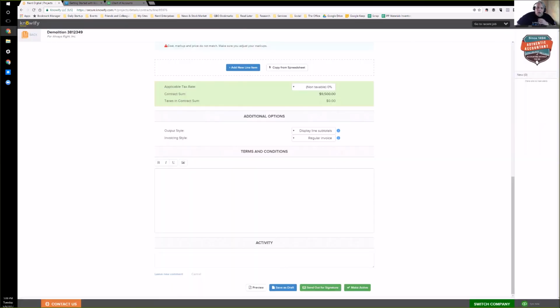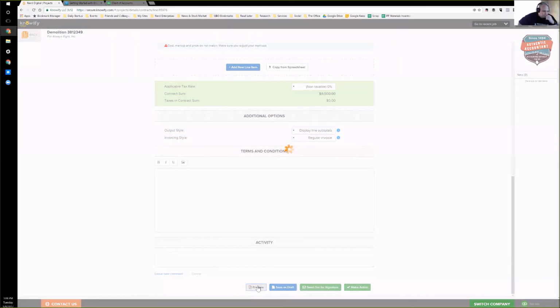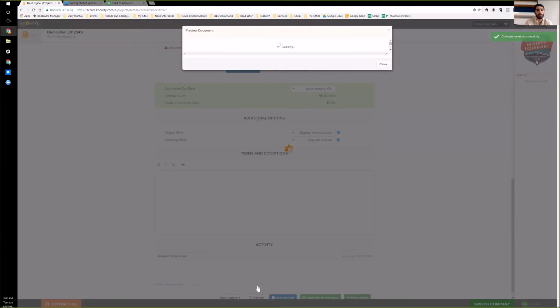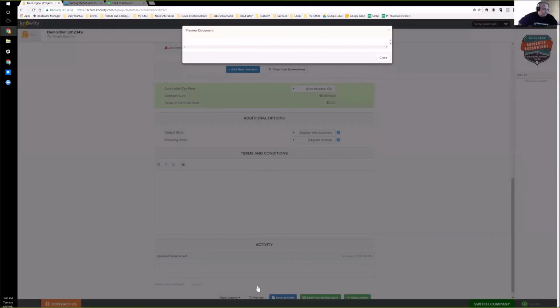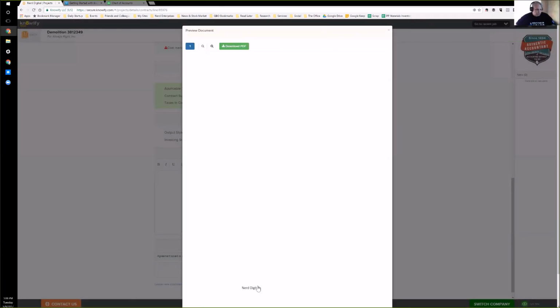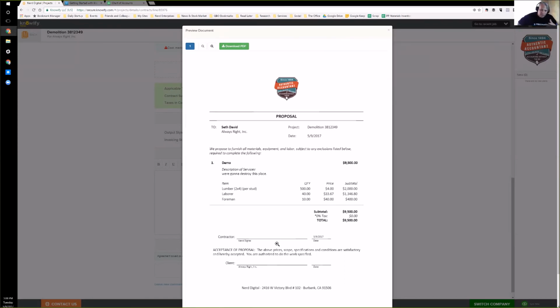Okay, so here's the thing, and I think you may have answered this, but just so I'm 1,000% clear: what my clients in the past have always wanted is 2 line items. Here's what we're charging you for labor, here's what we're charging you for materials. If you set up the project plan with 2 phases called labor and materials, it'll do just that. If you know that's how you want to bill, you create a separate phase for labor and a separate phase for materials.